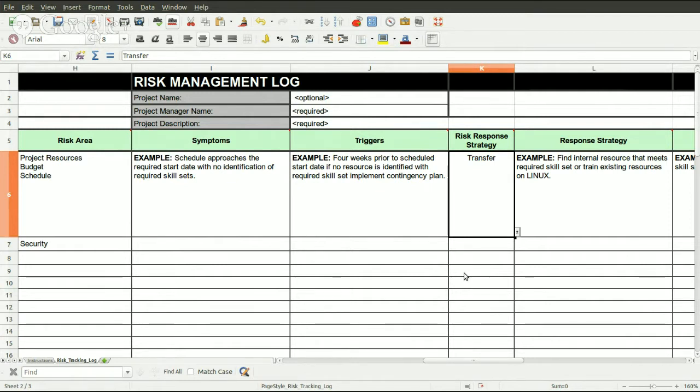However, at the higher level, the program or project manager still has responsibility for all those risks, even the systems level person. So as a group, you say, okay, this risk is not us. This is someone else's risk, and it's transferred to the person that risk is the responsibility of, and then that person has to address how that risk is taken care of. Right.